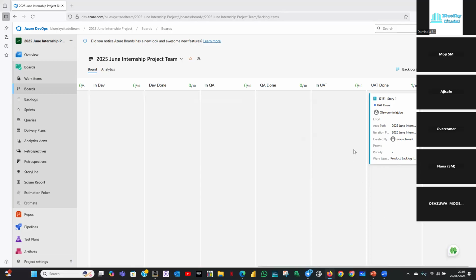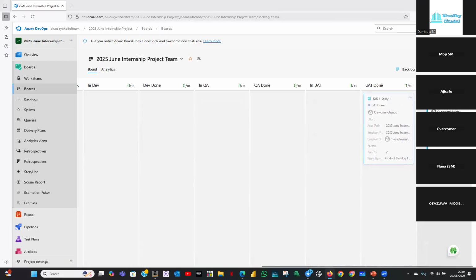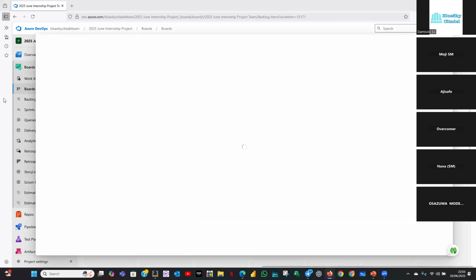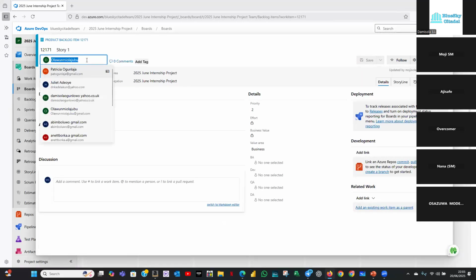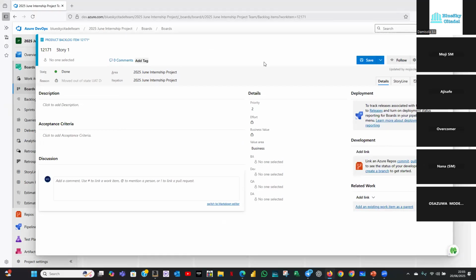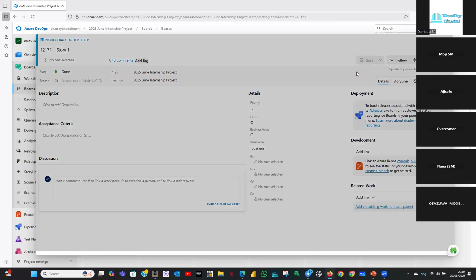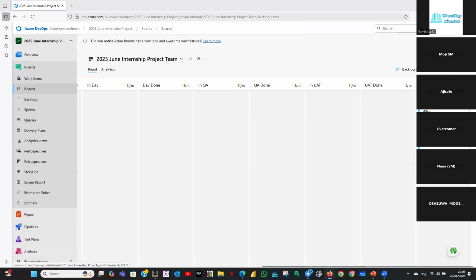At times, if this was put here after stand-up and all that, you can reach out to whosoever's task has not been closed on it just to check before you take it to done. Because once it is in done, what you're saying is this is done. And once it's in done, you want to remove the name of Allow Me from it, because what you're saying is everybody has finished what they need to do on this. So, okay, let me open it up and remove her name. Once that has been removed, I can save and close it. And it says unassigned. So you're unassigning, you're removing everybody, because they finished what they need to do.